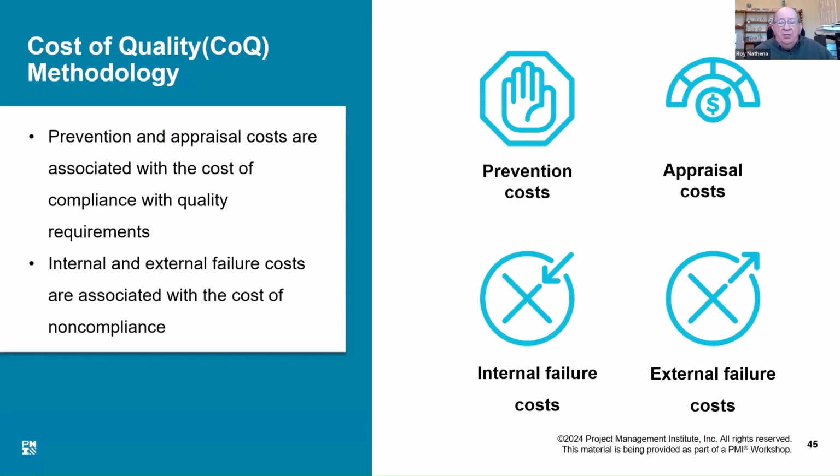Well, as I told you Monday, we had tons of people that were inspecting product, and product was still going out defective. If we can increase the prevention cost slightly, and it more than offsets the appraisal cost or the internal failure or external failures, if it more than offsets those, then that would be a good thing to do. We improve prevention or increase prevention costs to decrease other failure types of costs.